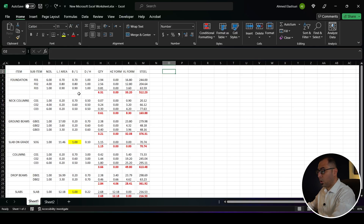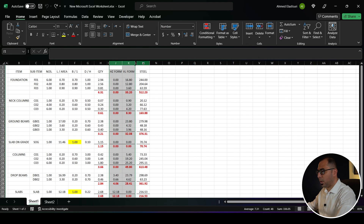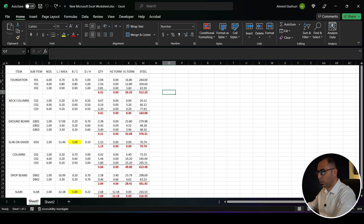After you calculate the quantities of concrete, steel, and formwork, it's time to start preparing a BOQ in order to do the cost estimation later on. After you get the measurements as we saw in the last video, we have the concrete quantity, formwork quantity, and the steel quantity.